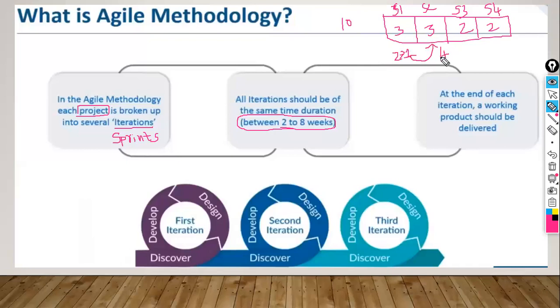The major thing we need to remember here is that we need to concentrate more on the functionality which is moved from sprint 1 to sprint 2. First, we need to complete this backlog, and then go ahead with the remaining three functionalities which are important in that particular sprint. Let us assume that after sprint 2 also, we are going to have one meeting with the client. In that meeting, we are showing four functionalities to the client.